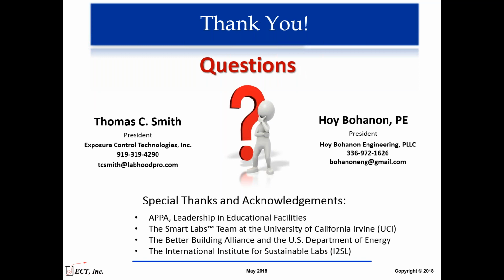Now, it may be that a simple conversion to constant volume could be a short-term solution. And in some places, recently we worked with an organization to develop a plan that would enable them to implement change over a multi-year cycle, say a 5-year plan. So within the budgets, in the first year they implemented a certain part of the program. They might have upgraded the hoods. The next year they did the controls. The following year they did the building automation system, and so forth. So over time, they used the budget and the budgetary constraints, and they implemented a longer-term program. So they didn't get the results immediately, but they were able to achieve those results by addressing them in a sequential fashion.